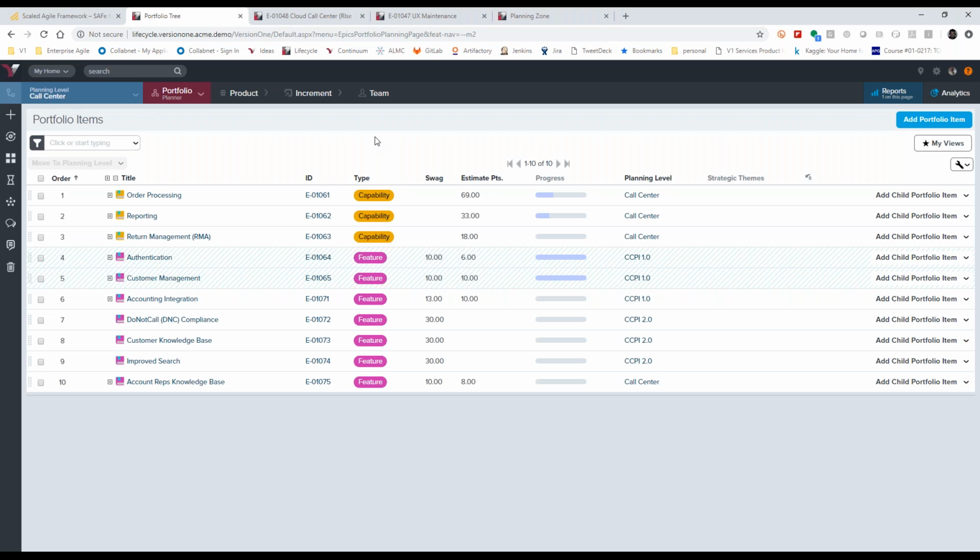That just indicates to me the level of maturity in estimation practices. So if you have a team, for example, that's used to sprinting on a 30-day sprint versus a team that's used to creating user stories to sprint on a 2-week cycle, those are estimation practices that teams will normalize on their own. And especially across organizations, you're going to have some variance between what an estimate is across teams, unless you have a practice in place that normalizes those story points in some fashion. One example of a normalized story point estimation would be to move from story points to ideal days. Coming from an Extreme Programming background, our estimates were in ideal days, and that was a way to normalize estimation across teams.